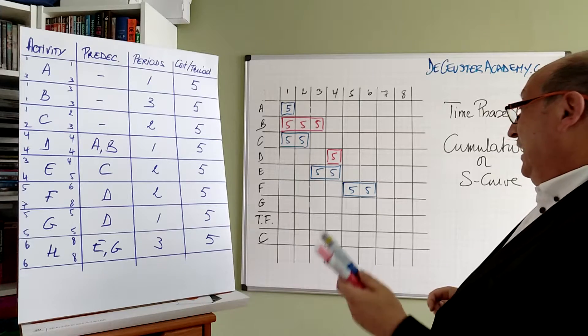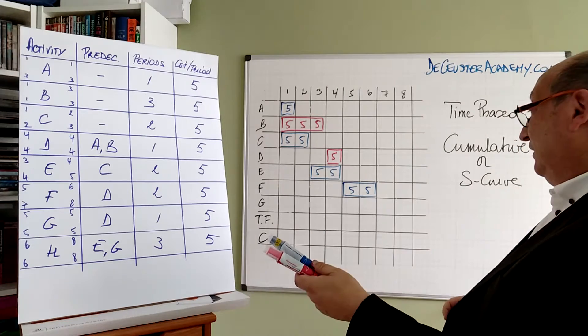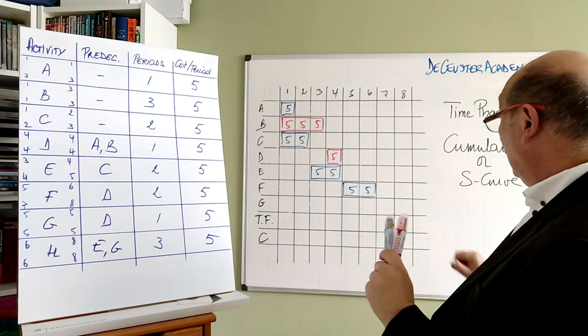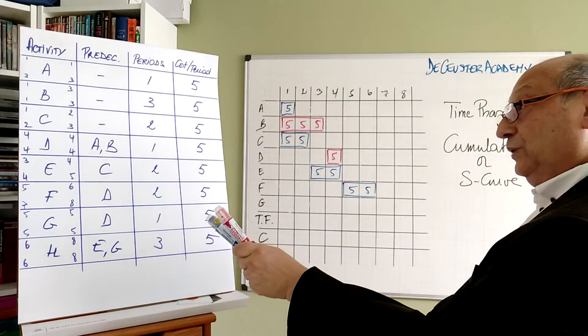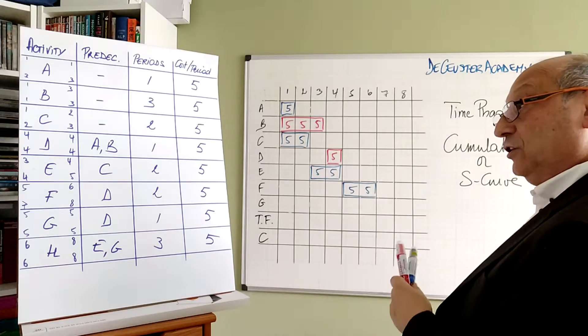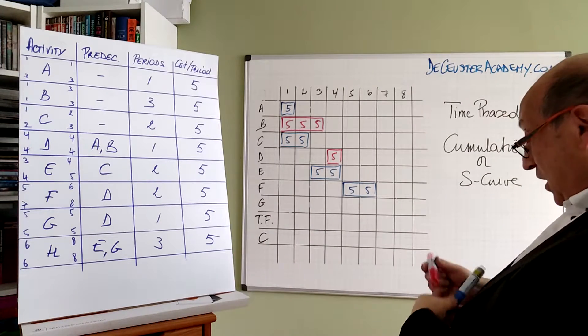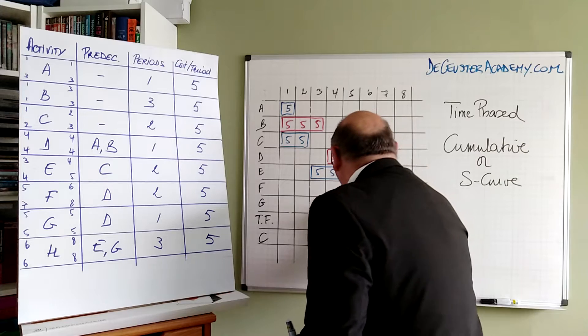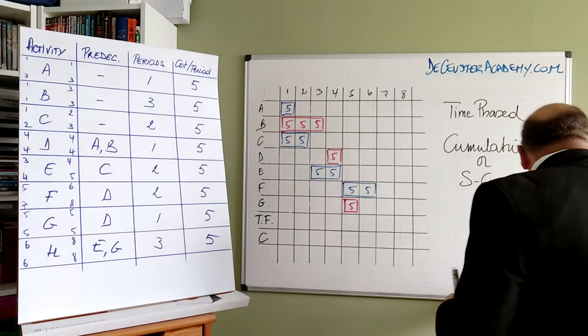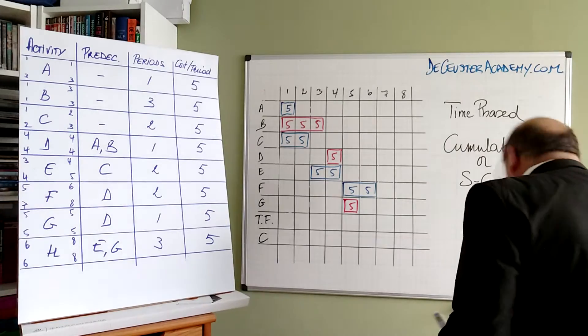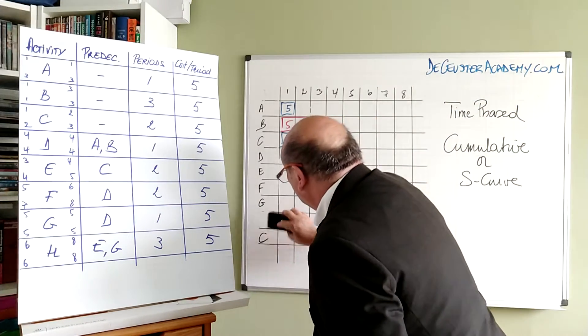G is critical. I forgot H on the table, but I will correct it immediately. So we have G, which is one period long from 5 till 5, but it is critical. So we have 5 here. And now we adjust our value here, which is H.